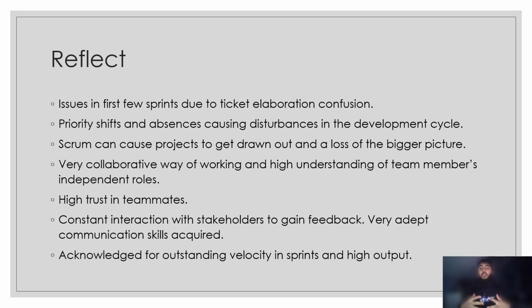story point system. So we would size tickets based on story points for complexity, so how difficult the ticket would be. And we use the Fibonacci sequence as our sort of, what the size would actually be. So 1, 2, 3, 5, 8. But the problem was we didn't really know what a ticket size of 3 looked like at first, because we had never worked on the project. And also, it was difficult to gauge how complex a ticket would be, not knowing what future work, how complex that would be. So this caused us to be quite confused at the start, and the solution was, okay, first